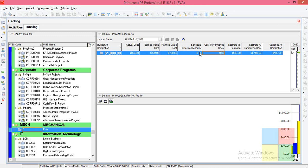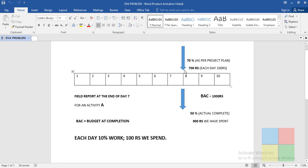The Cost Performance Index (CPI) here is 0.56. It works the same way — if the value is less than one, it means we are going to spend more money. You can see in the problem that at the end of the seventh day we finished only 50% of work and already spent 900 rupees, so the project is going to be delayed and we are going to spend more money.